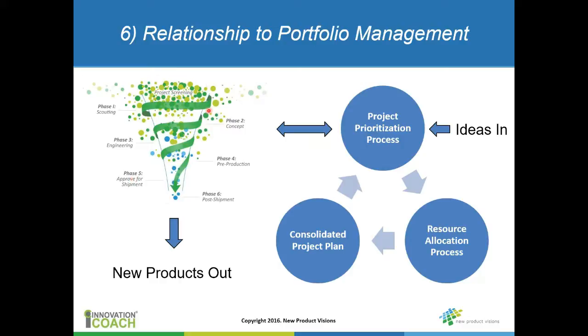But the fact is that, especially at the very beginning of PhaseGate, there's a lot of interplay between PhaseGate, the projects that are in your PhaseGate process, and the portfolio management process. That's the implication of the double-headed arrow. So you might learn something at the beginning of a project that kicks it back, and it might get reprioritized. The project might be put on hold. It might be killed. It might be reprioritized. So there's a lot of give and take here in terms of its interaction with portfolio management. Today we're really going to focus on this process.